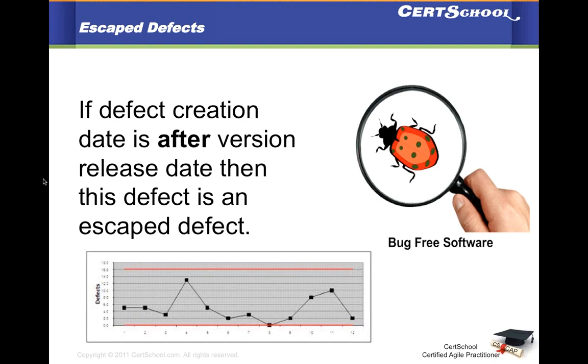Another way is, if you're doing more enhancements on the same feature piece, and there are more stories in your backlog that are unfinished, you can put this defect as an acceptance criteria in those stories. So you can handle this as a part of another story. It depends on what the teams feel comfortable with.